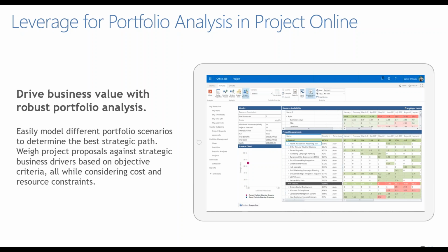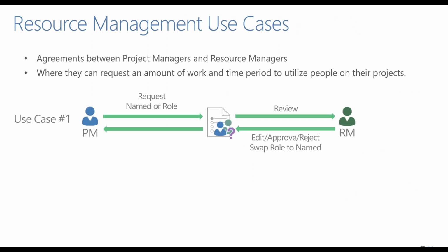So these are things that are all part of the mix that you don't necessarily get in a spreadsheet model. And then if we look at this, the typical use cases we have project managers making requests for resource types, and then resource managers reviewing those, looking at the resources they're responsible for, and then basically telling the project organization or the project manager, this is who we can give you for this time frame for this initiative.